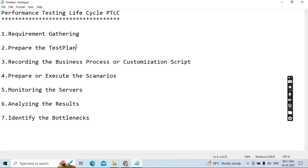The second phase is preparing the test plan. The test plan covers status emails, all requirement points, hardware configuration details, application details, what test tools are used, what is in scope and out of scope — especially for performance testing — and what the expected versus actual measurements are. The test plan needs to be reviewed and approved by the client.